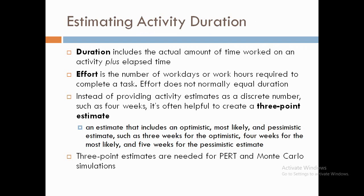After this comes estimating duration and effort — the number of working days required to complete a task. Instead of providing a specific discrete number, three-point estimates are used: the optimistic estimate, which assumes the project will be completed without any problems in the fastest time possible; the pessimistic estimate, which assumes everything that could go wrong will go wrong and the project will take the maximum time; and the most likely estimate, which is intermediate between the optimistic and pessimistic estimates.